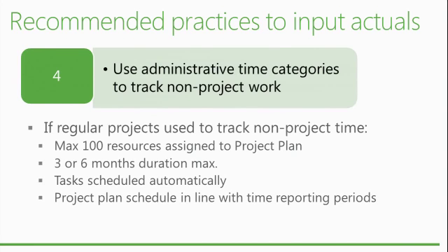Yes. And we also have users who say, and we see that in the engineering department, they don't want to use the daily bucket and even the task bucket. They want a project bucket for the week, for example, because they don't want their researchers or engineers logging their time day by day for each task they do.